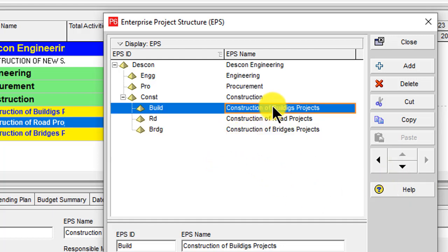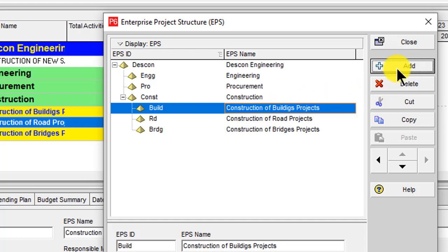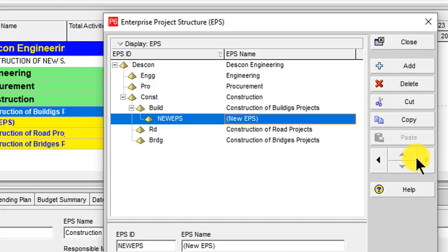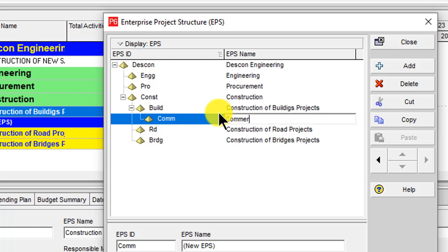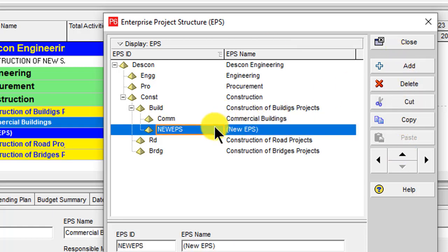If you want to break down further into sub-tasks, click Add and shift it right. For example, under Buildings we can add 'COMM' for Commercial Buildings, and a second one 'RES' for Residential Buildings.